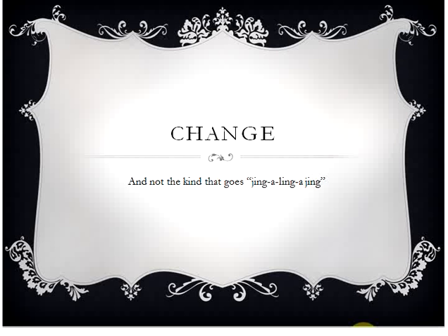And at some level, at least a group, usually the IT group, has had some chance to discuss it, plan for it, and come up with that implementation plan. And your implementation plan is going to include everything from what the change is to when it's going to be tested, how the education is going to go out to end users, when it's going to be brought live, how you're going to roll back the change if it goes really wrong.